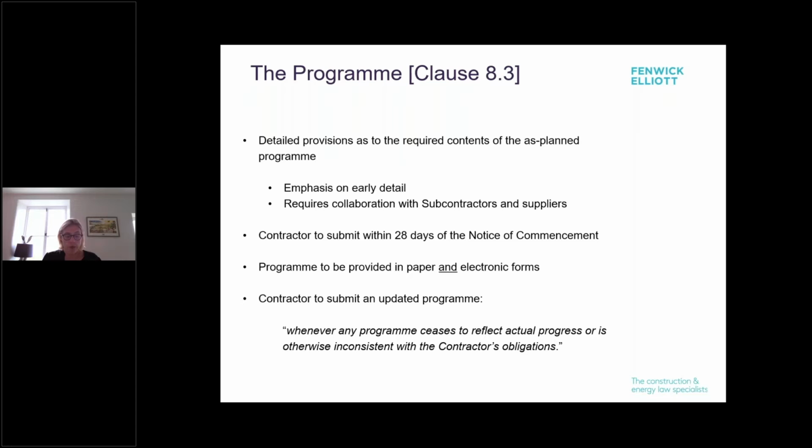The programme, there's some really helpful provisions on the programme if they are used properly. There are detailed provisions in there as to the required contents of the as planned programme. The emphasis is on early detail, and you're definitely going to require in-depth collaboration with your subcontractors and suppliers from a contractor's perspective to get that up to the level of detail you want. The exact level of detail cross-refers to the employer's requirements. So again, you need to think about what's in the employer's requirements in terms of your programme, but it is meant to be logic links for all activities, showing any float, and review periods for submissions and things like that should all be in there.